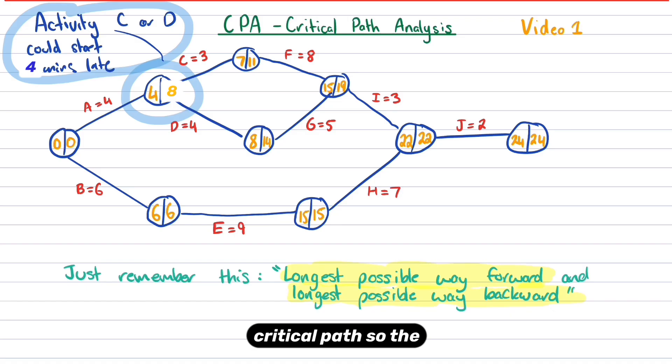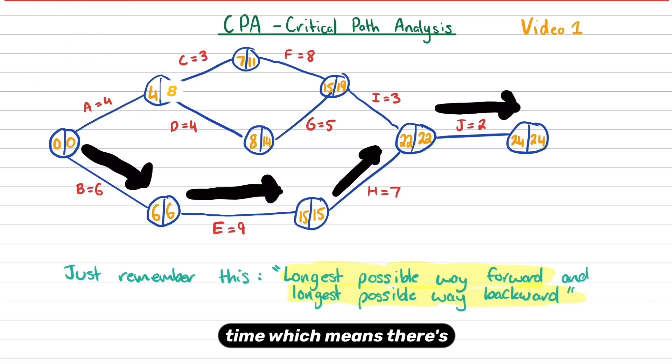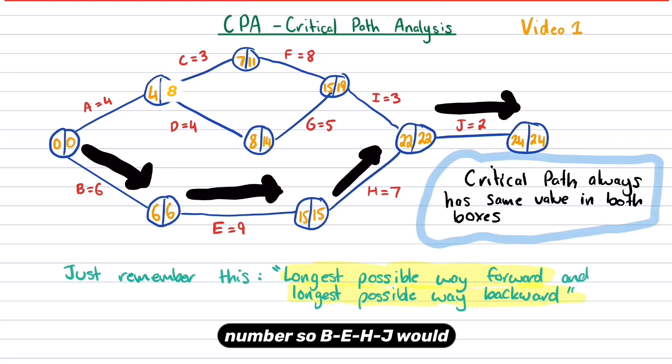Now let's talk about the critical path. So the critical path is a path where there's no float time, which means there's no space in between the earliest start time and the latest start time. So notice along this critical path, all of the nodes have the same number. So B, E, H, and J would be considered the critical path.